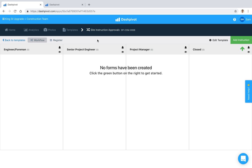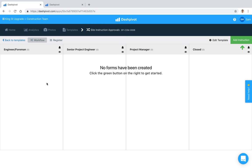I've already got a site instruction and approvals template set up inside of Dashpivot. You can see that it's been set up as a workflow, meaning that it moves between different people for sign-off. There's a process to it, and ultimately we want to move all of these items to the closed column.